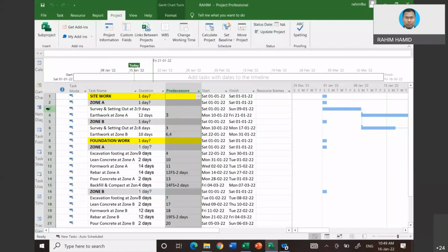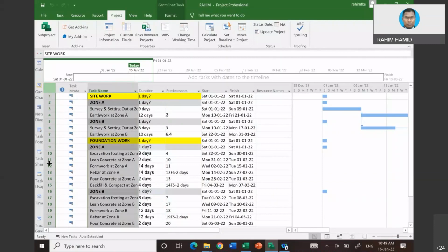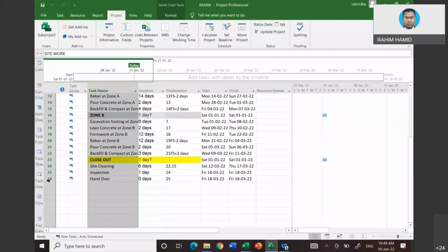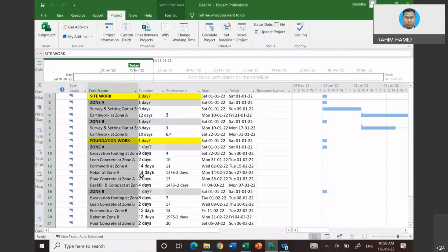That is how the input works in Microsoft Project, even in Primavera. The computer does not recognize the task using the name. It only recognizes the unique ID, which is automatically generated by Microsoft. You notice that the ID runs from 1 until 26, because that is the number of rows that we input the information into.